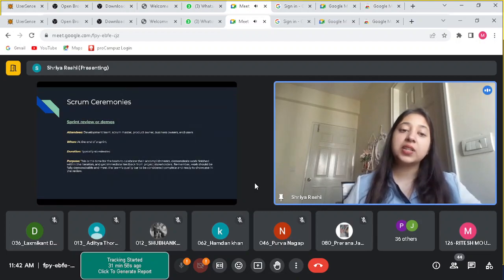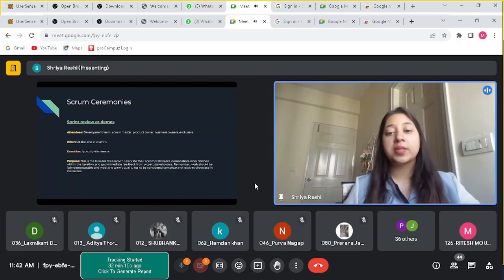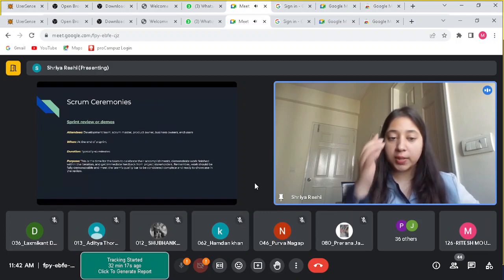Now, once a sprint is over, we have sprint reviews or demos. Attendees for this will be obviously the development team, the scrum master, product owner. Now, since we are doing a demo of what we have built, we also include our business owners and end users. It happens at the end of the sprint, and usually it's a 45 minute call.